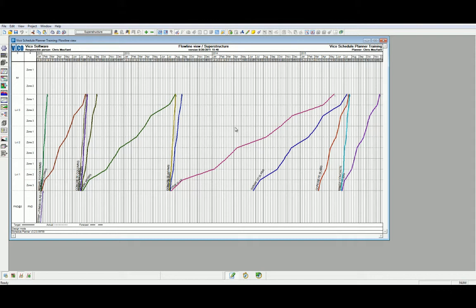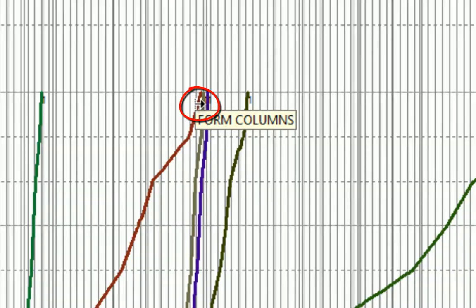We will aim to align tasks by adjusting the resources to match the slopes. We need to start by identifying converging and diverging task lines like the Form Beam, Form Slab, and Form Column task lines. So, in this instance, we're going to start with the Form Columns activity.